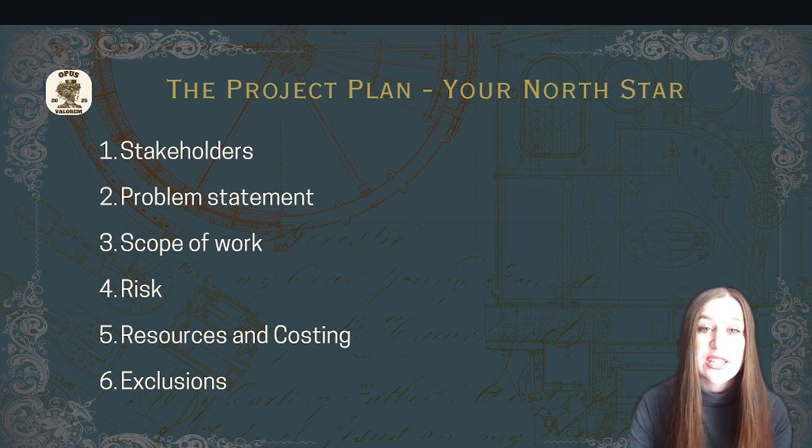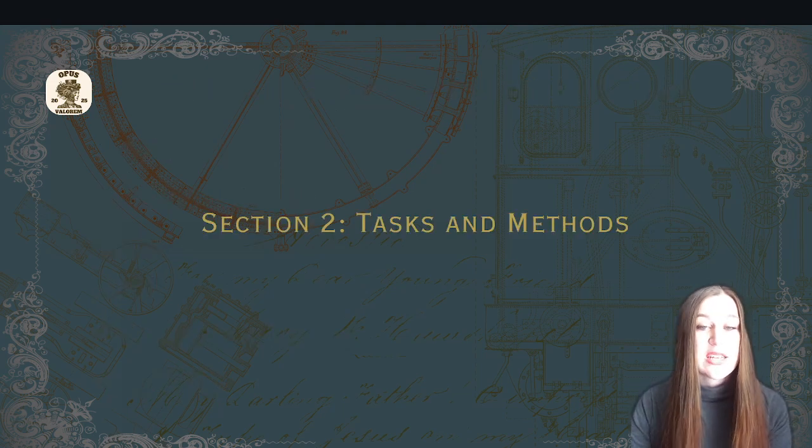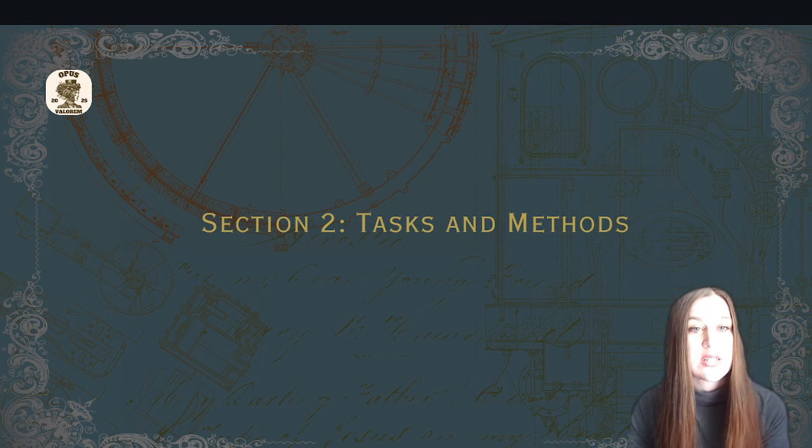It may include exclusions and payment details as well, but most importantly, it is an all-encompassing document that is created and agreed upon at the outset of the project. Any additions or changes to the work detailed in this document will need new terms of acceptance. This is your North Star as an engineer. The project plan is where you find the answers to all the possible questions you might have at the outset of the project. If there are more questions than answers, you are either looking at a poorly drafted project plan or venturing into project execution land.